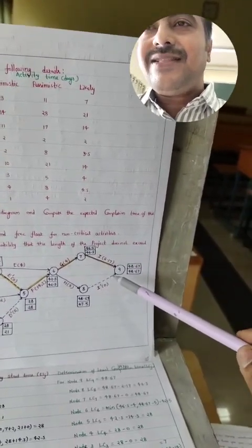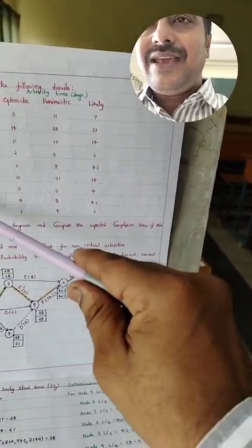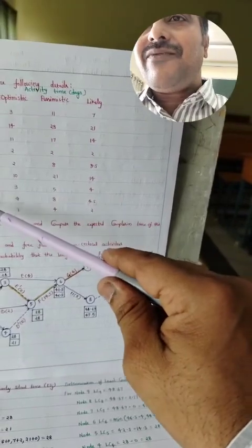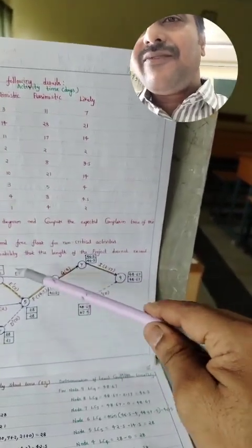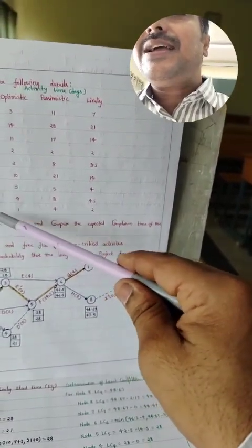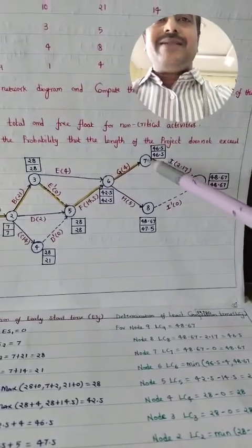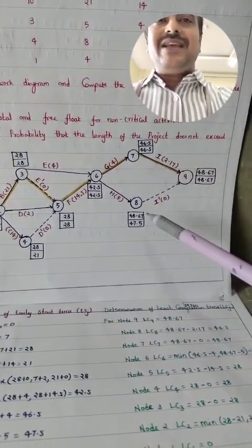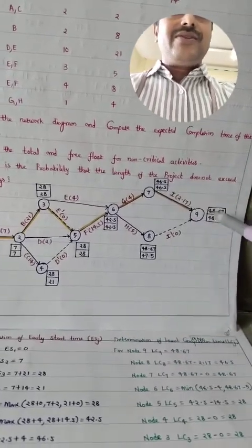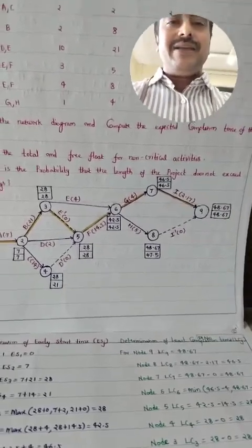Why I am considering it like this is because G and H are happening after E and F only. But after G and H are happening, I is happening. Means from these two we cannot get a single node, so we are having a single node with two lines. One is taken as I and the other is taken as the dummy I dash.